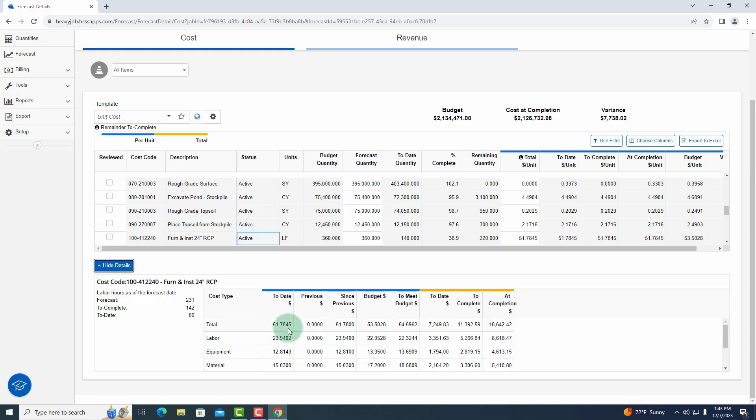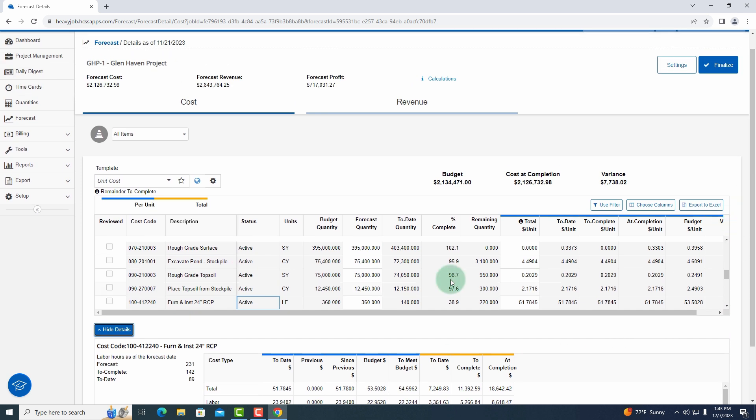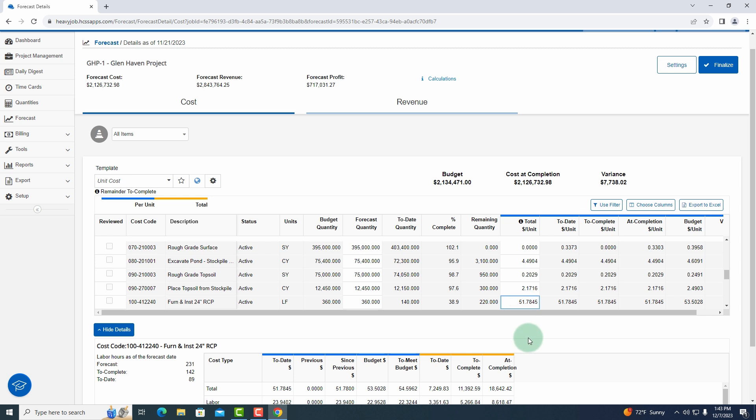Now I need to start using my project management skills to come up with what am I actually going to complete the remaining 220 linear feet, what dollar per unit do I think that's going to complete that? So I can use a to date value, I can use my budgeted value. If you know a different value, this is where we expect you as a project manager to come into this item and then change that total dollar per unit.